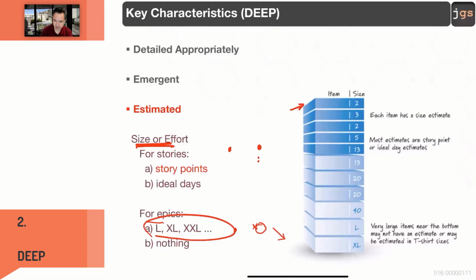For the stories, two things that are very specific: story points or time. Time in days or time in hours, up to you. Time. How long is it going to take you, your team, to do this particular activity, this particular fixing of the defect, this particular knowledge acquisition? How many hours do you need? Or do you want to talk about days? How many days do you need? We consider 1 day to be 8 hours. So you can talk in either of those two units.